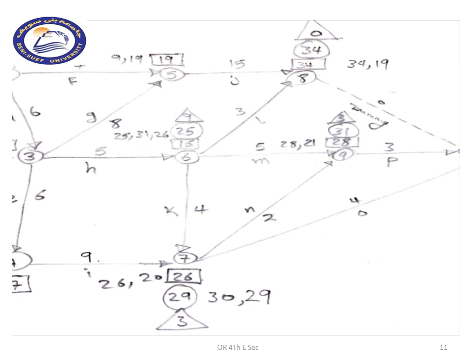It will delay the finishing of the whole project, because if activity N supposedly started at week 30 and activity N will take 2 weeks, this means that we are in week 32 and we didn't even start activity B that will take 3 more weeks. So if we choose the number 30 instead of 29, this will mean that the whole project will be delayed by 1 more week. So here, when we are deducting the times, we will select the lower amount.